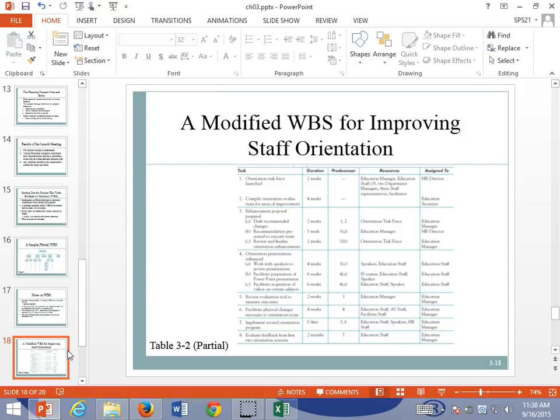And so here, for example, is a breakdown on a staff orientation. I know it's kind of small and hard to read, and I got to squint, but what we're looking for is, here's another way to do it. We break these down into kind of bigger chunks. So these are big durations. We start then getting this idea of precedence in there. So precedence, we know that things have to happen before another task can occur. And in Microsoft Project, we get to see very quickly how some of those work. And Hunter, this is kind of the basis for that network diagram again.